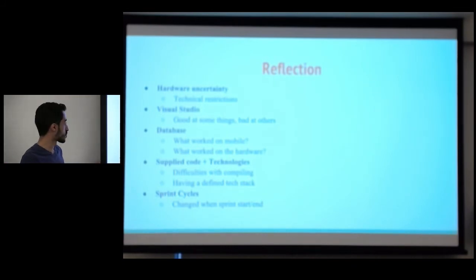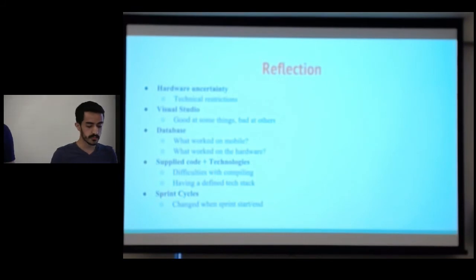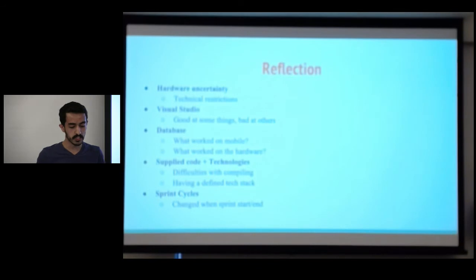Finally, for our sprint cycle, we changed it to better match Wegmans' cycles. We also had an issue where sprints would end on Friday, and when sprints end on Fridays, people weren't around to finalize things. And having the next sprint begin before Monday was proven to be difficult.